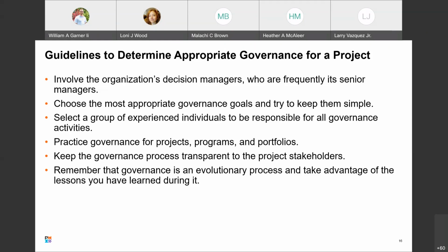But in the event that something gets pulled back or reprioritized for whatever reason, the risk is that they've spent time working on design or architecture, or something else. That would be the risk you have there. So that's a great example, Heather. Thank you for that. Any other contribution, please, to the sequential and overlapping relationships? Anybody not understand those terms, please?